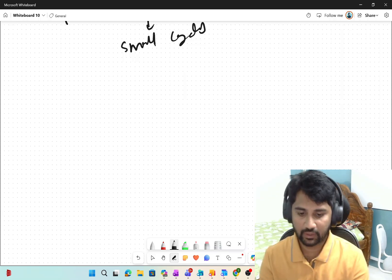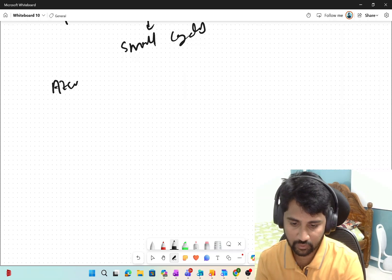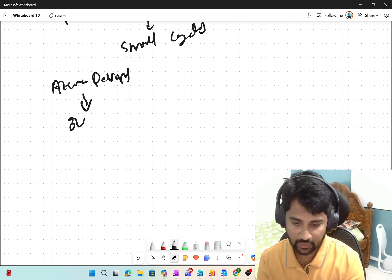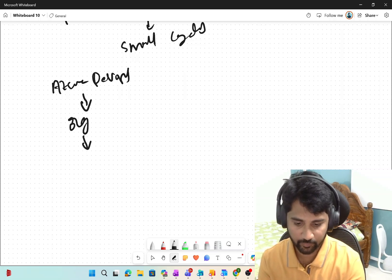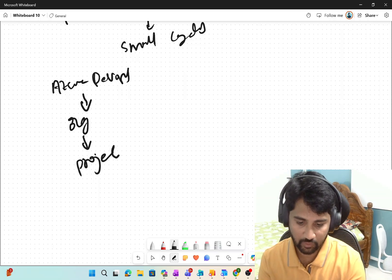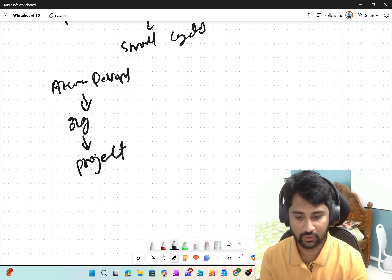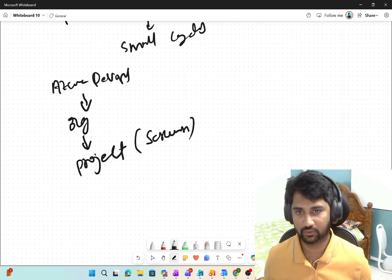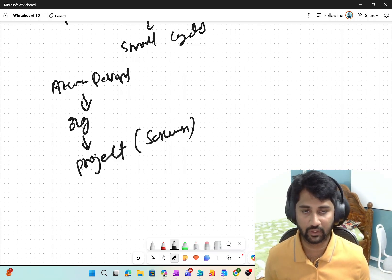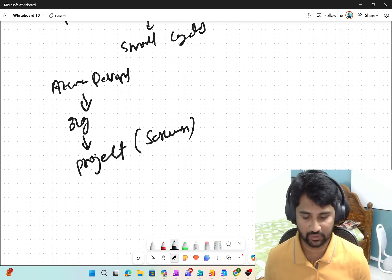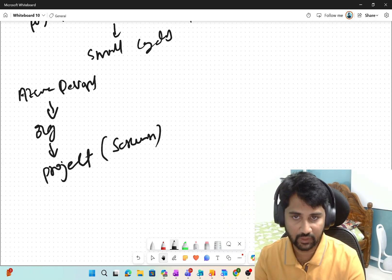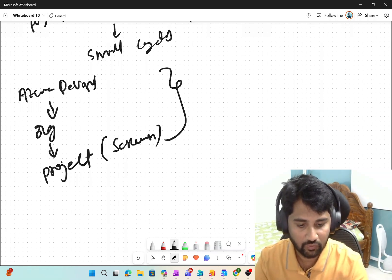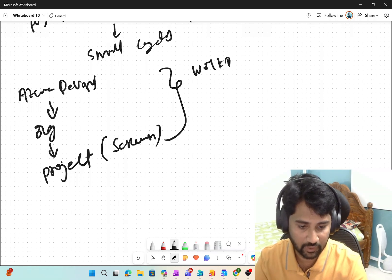When you create any project in Azure DevOps, this is how it will go. You will go to Azure DevOps. Inside Azure DevOps, you will have an organization. Inside that organization, you will create a project. And when you create a project, that's where you select the process — what process you want to follow for that project, maybe Scrum in this case. Once you select that process, you will get various work item types.